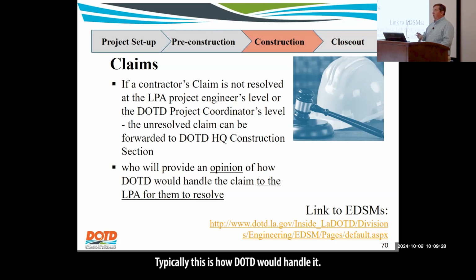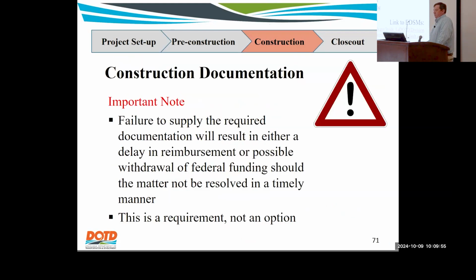Typically, this is how DOTD would handle it, and we'll provide that as a recommendation, but it's ultimately up to y'all whether to incorporate that recommendation or not. It's an opinion. You're not held to it. We might say pay them a portion of it. We might say, nope, we agree with y'all, pay none of it, whatever the case may be. Just know that we'll provide an opinion, but it's up to y'all to resolve the issue.